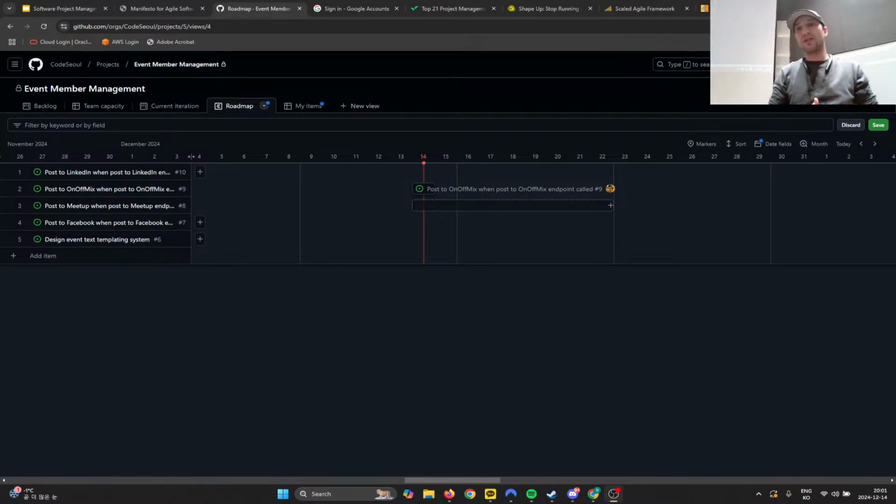Part of me wants to say, oh, do this for that team size, do that for that team size. But I don't think team size is necessarily the metric to use. I think for better or worse, the best way is to experiment, because some teams are very good at self-organizing, and you could just throw a Scrum board up and they're good. If they're proactive, if they're good communicators, even if it's a large team, if their communication cycles are super short, and they're able to deliver fast and also communicate fast, Kanban might be good enough. But if you have people who maybe are not so proactive, or the stuff is so complicated that they can't keep everything in their head all at once, you might have an engineering team of like 4 people, but they interact with a whole bunch of other teams, and there's a whole bunch of communication that happens that they're not necessarily in control over, and that takes a lot of time and effort. Maybe Kanban's not good enough.